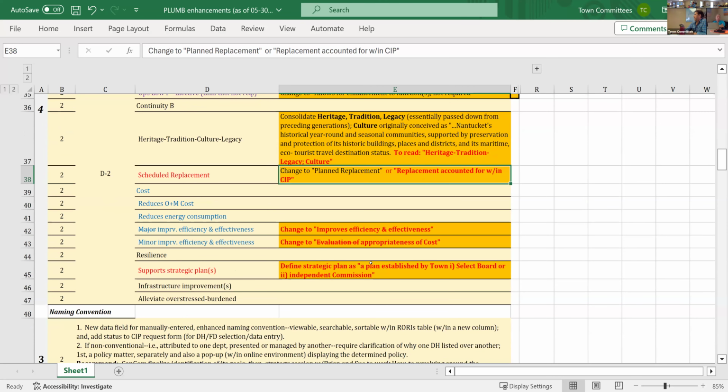Yeah, they get a lower score on that, but if it went to an out year, then for me, the value of this is, well, first of all, it's a relatively low percentage overall, but what it's doing is ticking up a request that somebody put into the system. Now, they put it into the system prior. So for instance, say you have a department that goes through the exercise of looking at how quickly its vehicles are worn down for whatever reason, and they put in a 5-year plan, and that's reflected within the SIP. That to me gets a reward.